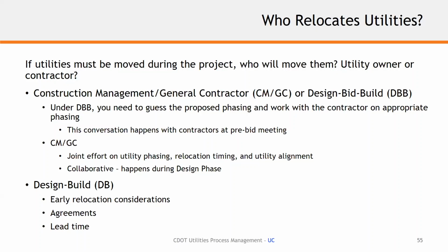I had a project up south of Kremmling on State Highway 9, where we had 10 miles of wildlife game passes, where we needed to move 10 miles of phone, fiber, and power, and things like that. And so we knew it was going to be difficult to move 10 miles of utilities prior to the start of this project. And this was design bid build, and we had decided with the utility companies that if we could move the first 5 miles before construction started, identify that in the plans, identify in the